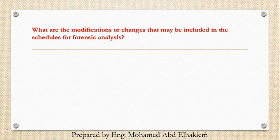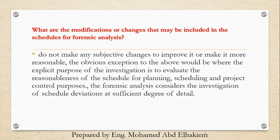What are the modifications or changes that may be included in the schedules for forensic analysis? Do not make any subjective changes to improve it or make it more reasonable. The obvious exception would be where the explicit purpose of the investigation is to evaluate the reasonableness of the schedule for planning, scheduling, and project control purposes. The forensic analysis considers the investigation of schedule deviations at a sufficient degree of detail.